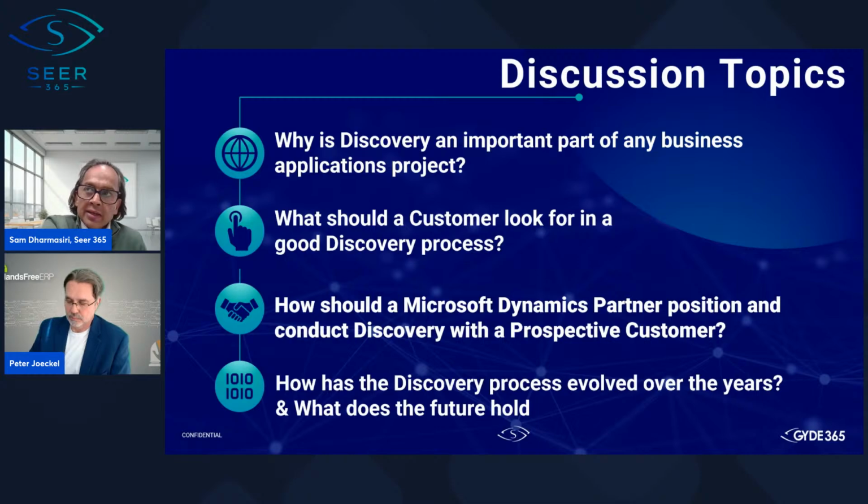Yeah. And I said, capturing the requirements is one aspect. How do you analyze that data? How do you then advise the customer on, do you really need this requirement? Is it really going to impact your major priorities? Is it something you could move to a phase 2? You've got this requirement that's probably a gap in the target solution you're looking to deploy. Is it super important to you? That's where I think the partner's expertise, their industry experience, that's where they've got to shine, right?